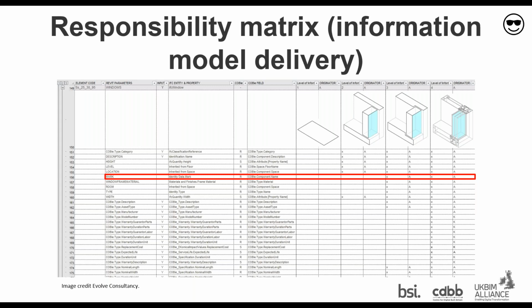And why is that important? Because that will then be the component name asset handover. So that will be the COBie component.name. Similarly, it identifies that the model number needs to be completed during stage 4. In this example, it's showing the role code as K as a client, and that's because in this example image the client is a contractor, so that is a contractor's responsibility to complete that information for the asset during that stage. And so that could be a K or a W.